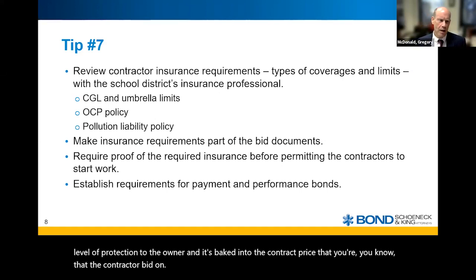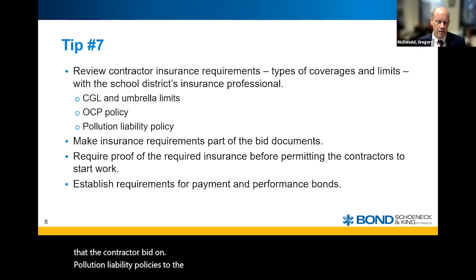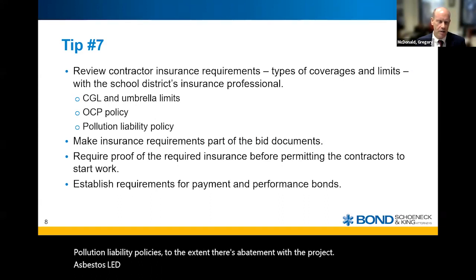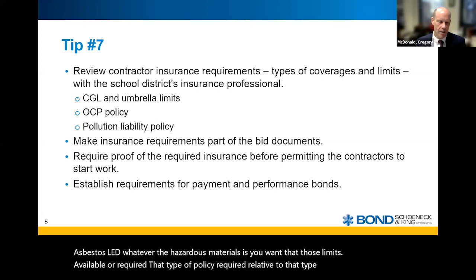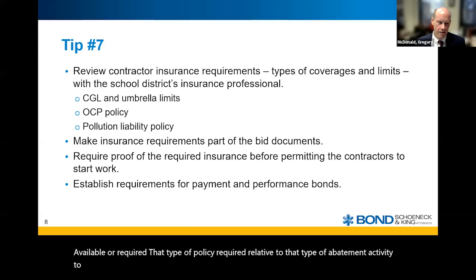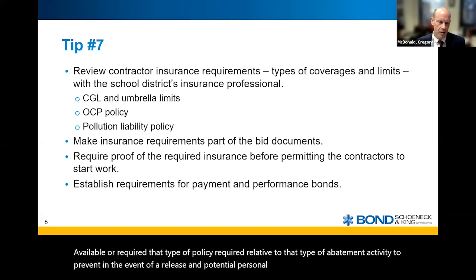Pollution liability policies, to the extent there's abatement with the project, asbestos, lead, whatever the hazardous materials is, you want those limits available or required, that type of policy required relative to that type of abatement activity, to prevent, in the event of a release, and potential personal injury or property damage associated with that release.